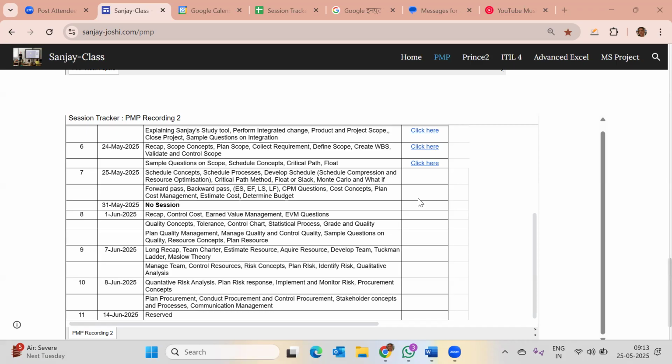The option is to give that back to the product owner and let him decide the priority. It is quite possible, Kuldeep, because you have told that we have already done the grooming for this, we have already done some part of it. He might add it into your next sprint backlog, which is okay.